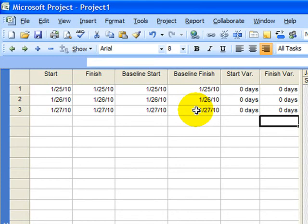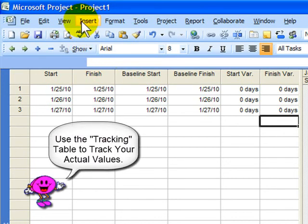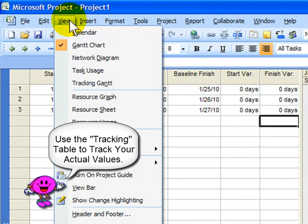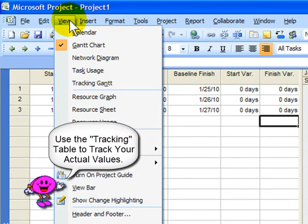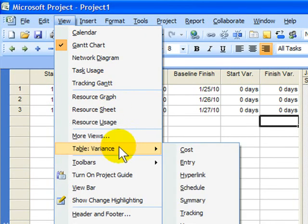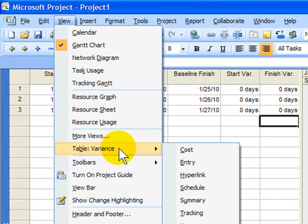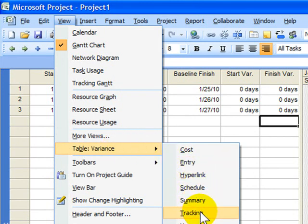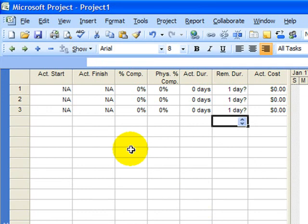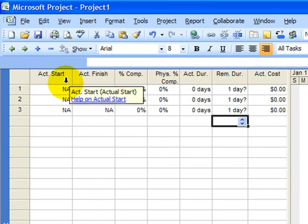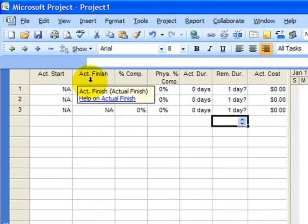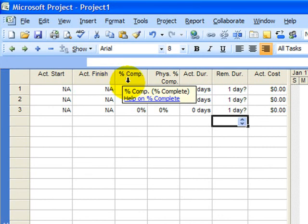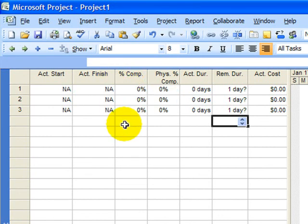Where would I go to track a project? I'd go to a different collection of columns, not the Variance table columns, but the Tracking columns. Because the Tracking columns have columns named Actual Start and Actual Finish or Percent Completion. That's where I can begin to track the status of a project that is in progress.